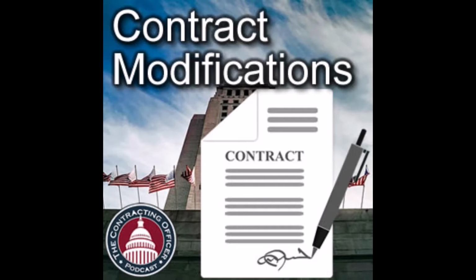And the biggest out is the last sentence where it says, at least a ceiling price shall be negotiated unless impractical. So, of course, if you have time, you want the contractor to say, this change is going to cost you no more than $1 million. I'm positive, and I'll sign a binding document that says, here's the ceiling for this change. And then you negotiate it, and it's going to be under $1 million. But you don't even have to do that if it's important enough, and that's not practical. And that's why this paragraph is huge.